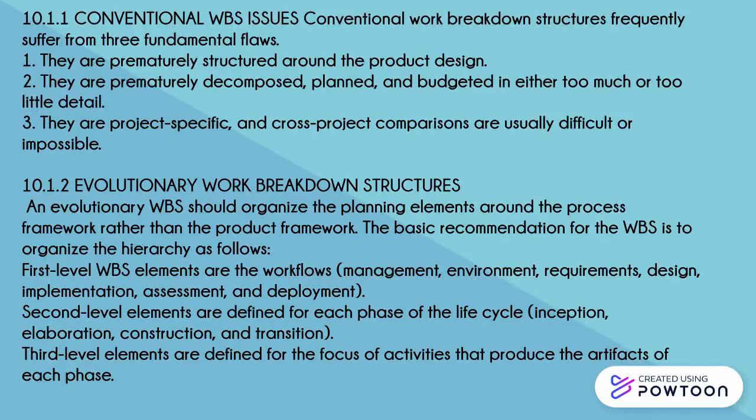Conventional WBS issues. Conventional work breakdown suffers frequently from three fundamental flaws. They are prematurely clustered around the product design. They are prematurely decomposed, planned, and budgeted in either too much or too little detail. They are project-specific, and cross-project comparisons are usually difficult or impossible.